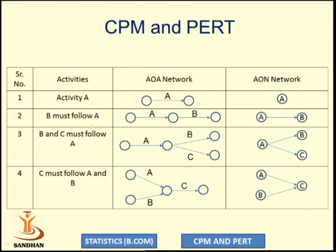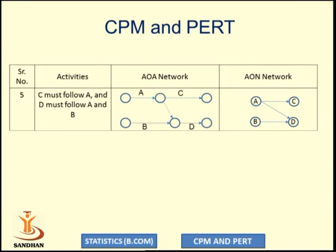In an AOA network diagram, C is the successor for A and B, or A and B are predecessors for C, but they are on the arrow. In an AOA network diagram, activities are represented on the arrow, while in an AON network diagram, the activities are denoted on a node.